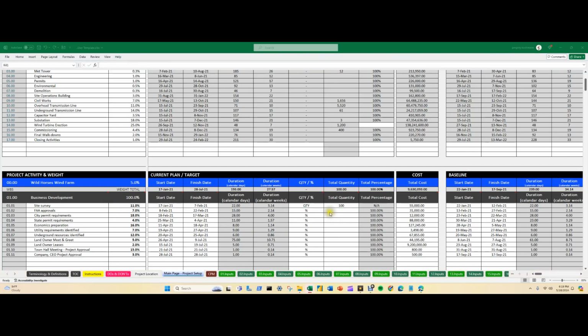So this prevents what happens in other project management software or Gantt charts like Microsoft Project, Primavera, Smartsheet, where you have to use a Gantt form and use the SS, SF, FS, and FF logic. This uses critical path method versus what they use. So instead of having to do 100 lines for different quantities, you can just put the quantity itself and connect the two activities together, and it will properly track everything for you. We do all the calculations for you.